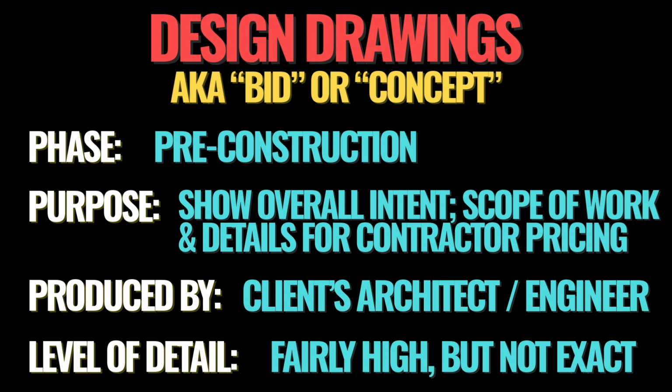Once this initial set of design drawings is reviewed and approved by the Department of Buildings, for example, or any other agency with authority over construction, they may be refined to show a bit more detail. The reason for this is that they're ultimately going to be used for the purpose of bidding and pricing by contractors and manufacturers in order to establish costs. And from there, these design drawings will ultimately depict the official scope of work that the awarded contractor is expected to perform on the project, among a host of other key documents. And just to reiterate, design drawings are created and distributed before a project ever actually physically starts.